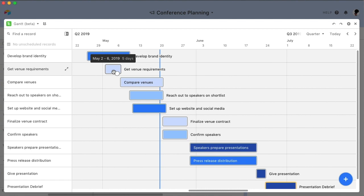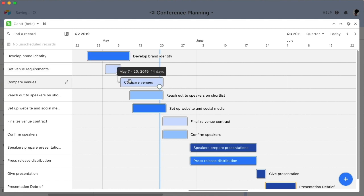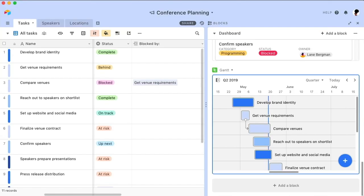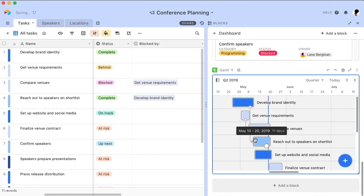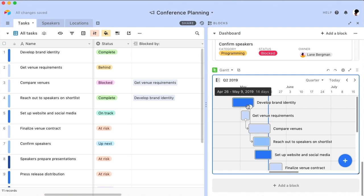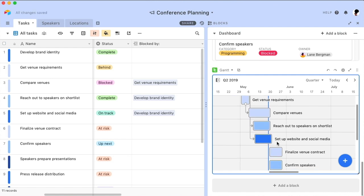And now you're ready to start drawing some dependencies. Start off by hovering your mouse over any bar on the chart. This will reveal a white circle on the bar's perimeter. Click here and drag your cursor over to any other record on the chart to establish a dependency. And as you draw dependency arrows, the linked record field you created will automatically populate with that same information.